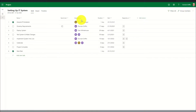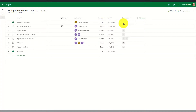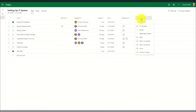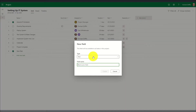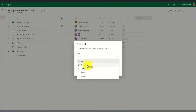When the project is open, a list of tasks will appear firstly in a grid view. The supporting information about the tasks includes the assigned-to resource, the duration of the task, the task start date, and the task dependencies. In addition, several hidden columns are available such as the percentage complete, the effort, and the finish. Custom columns can also be created depending on the needs of the project — in this example the custom field 'deadline' will be created.